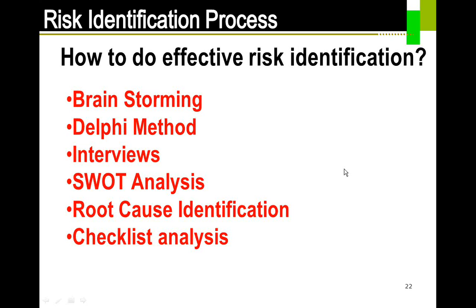If we are able to identify these root causes, and they are true, then from attrition we went to the extent of really looking at whether the technology that we are trying to use for this project is right or not. Then we might even look at changing the technology. That is why root cause identification is very important. The last one is